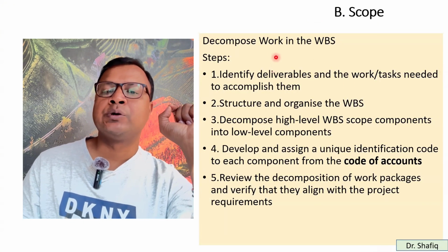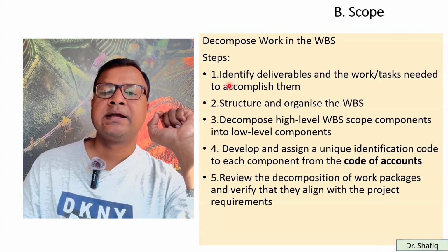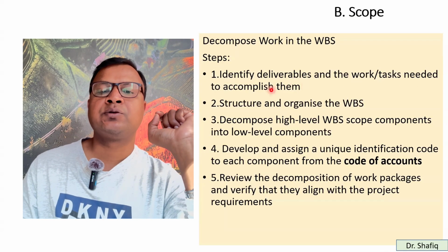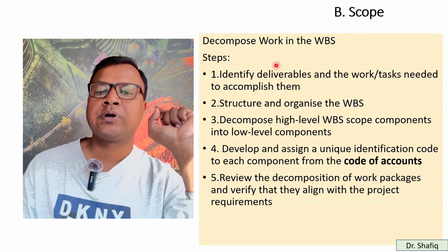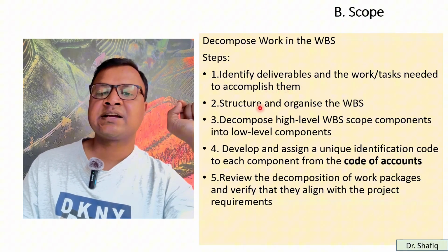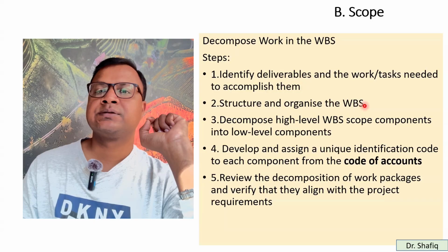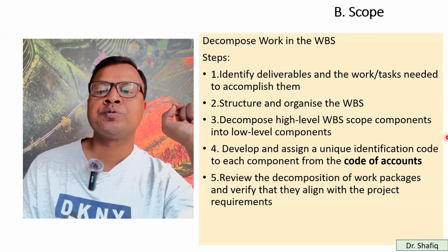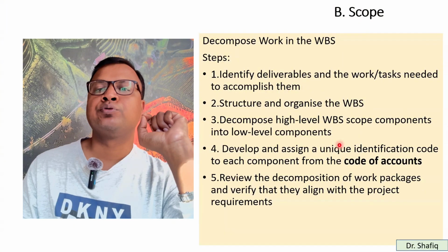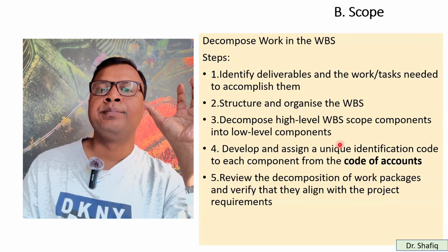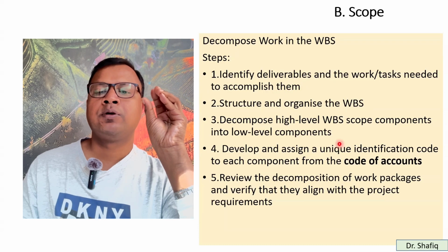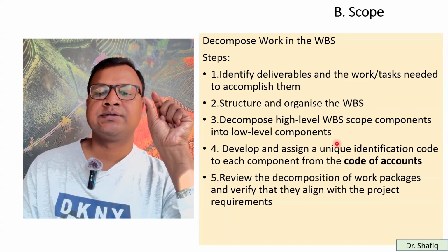So how to decompose the work in the WBS? The first step is to identify the deliverables and the work tasks needed to accomplish them. So focus on the deliverables. Then structure and organize the WBS. Then decompose high-level WBS scope components into low-level components. So you have a big one, so you have to make small work packages.